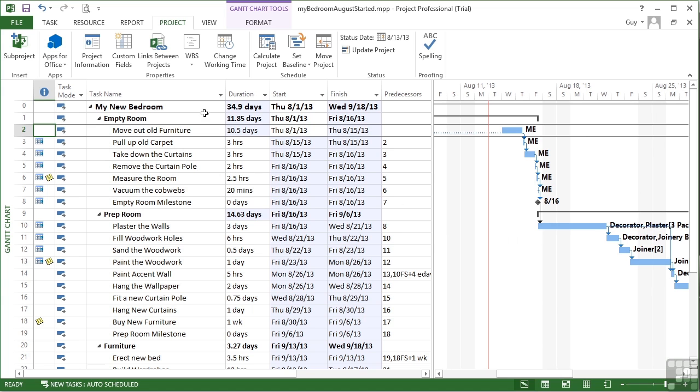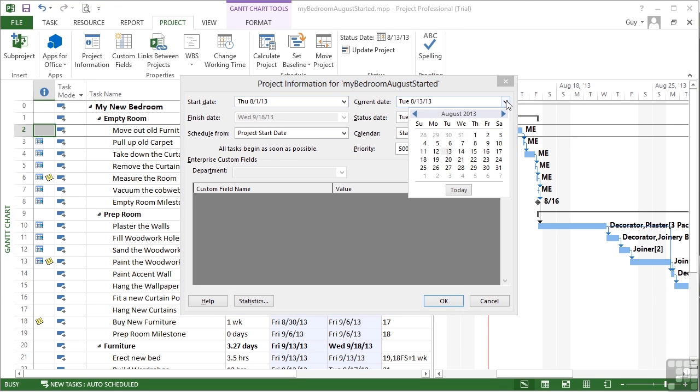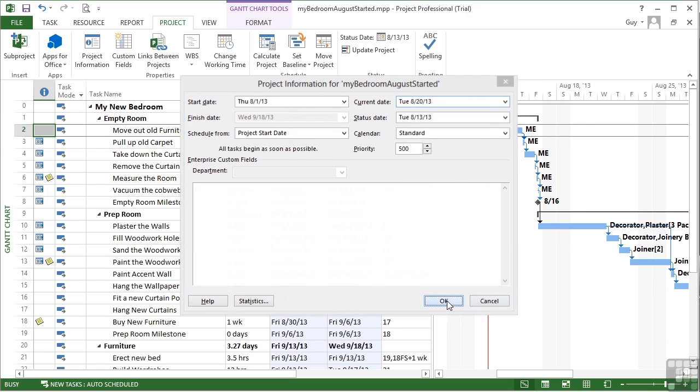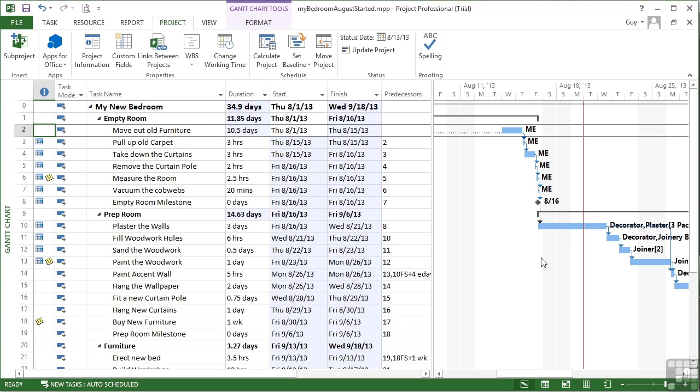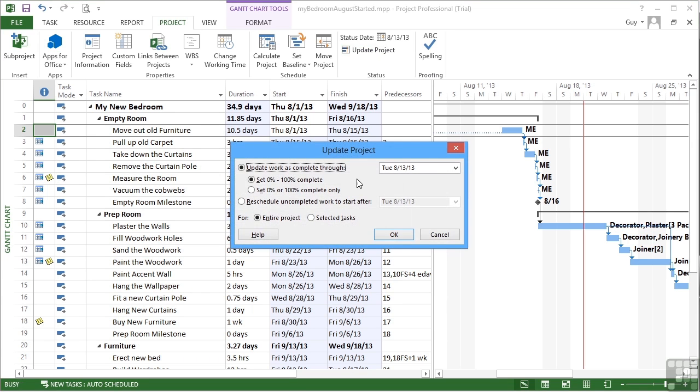If I then move today to project information, let's go ahead another week, go to 20th. So we should now be here. But by the time we get to here, we have caught up on ourselves, then I would go to update project.